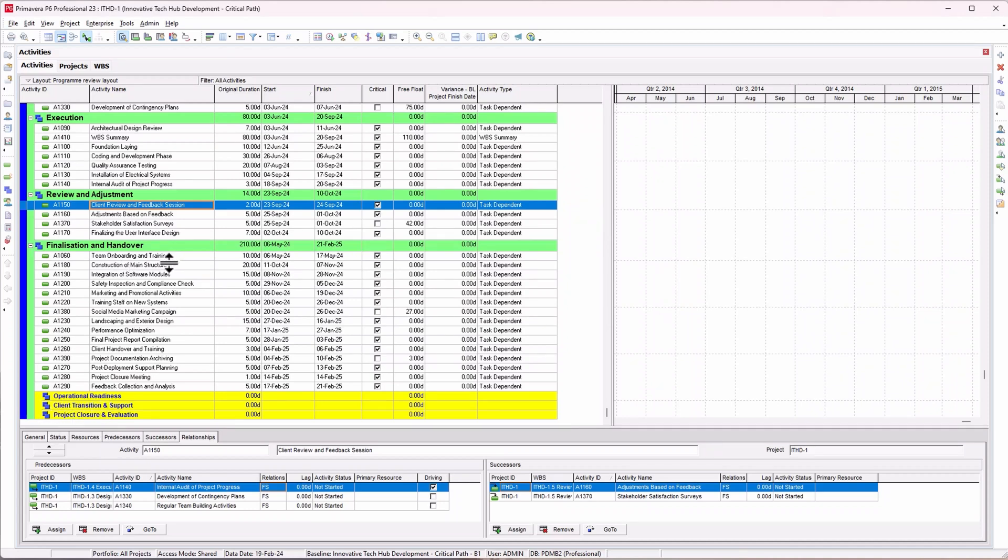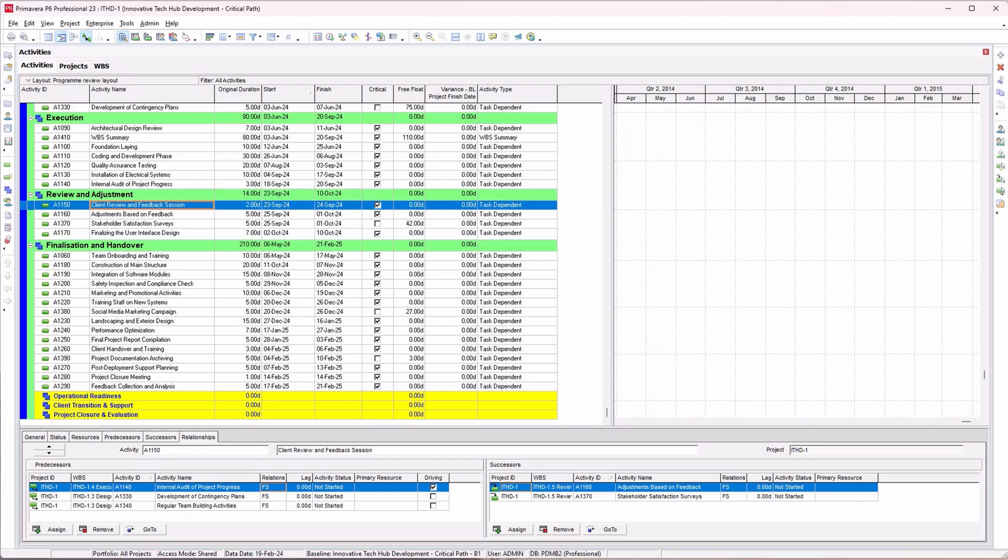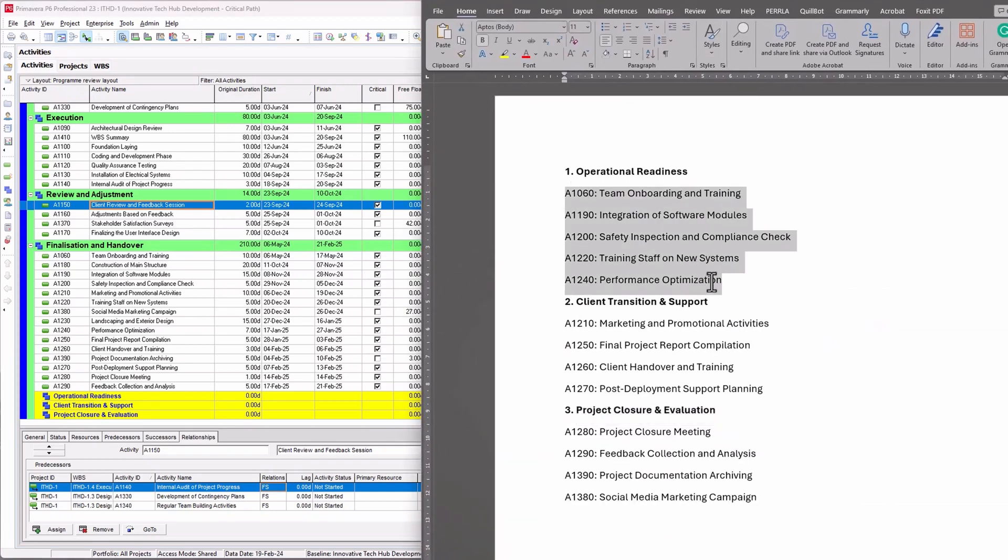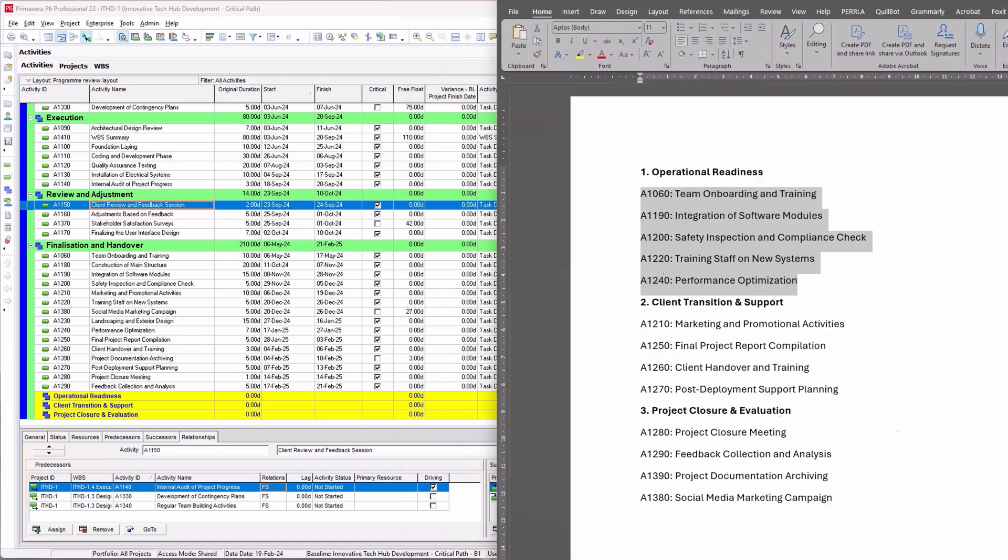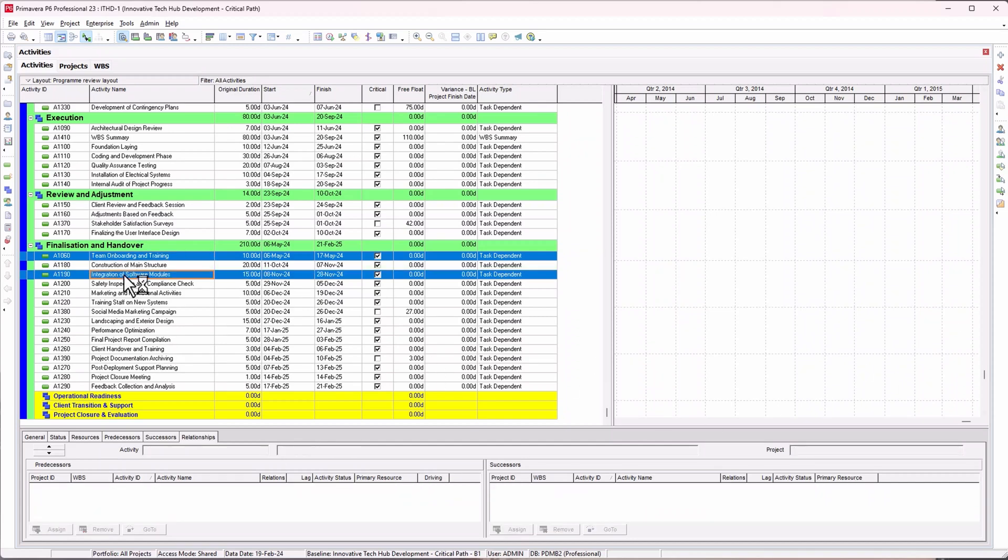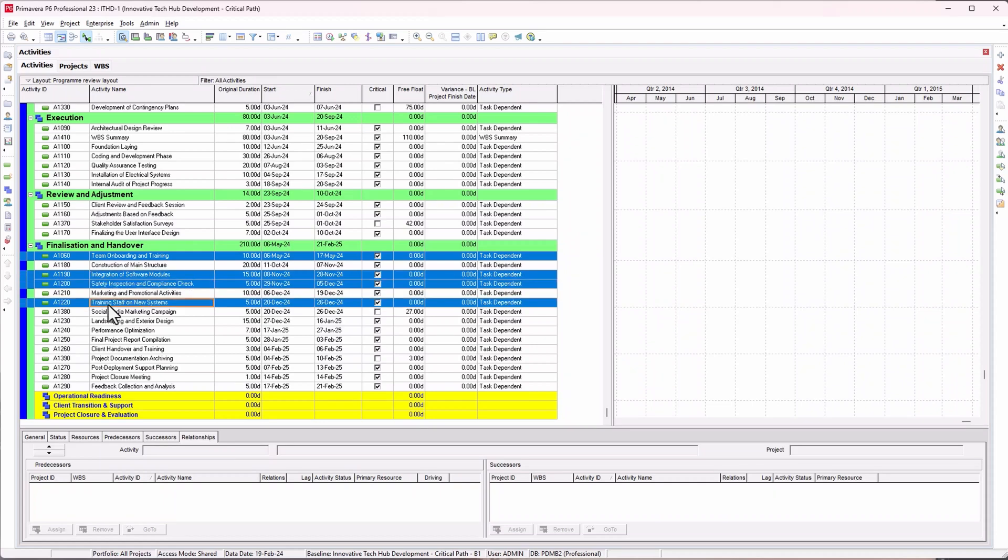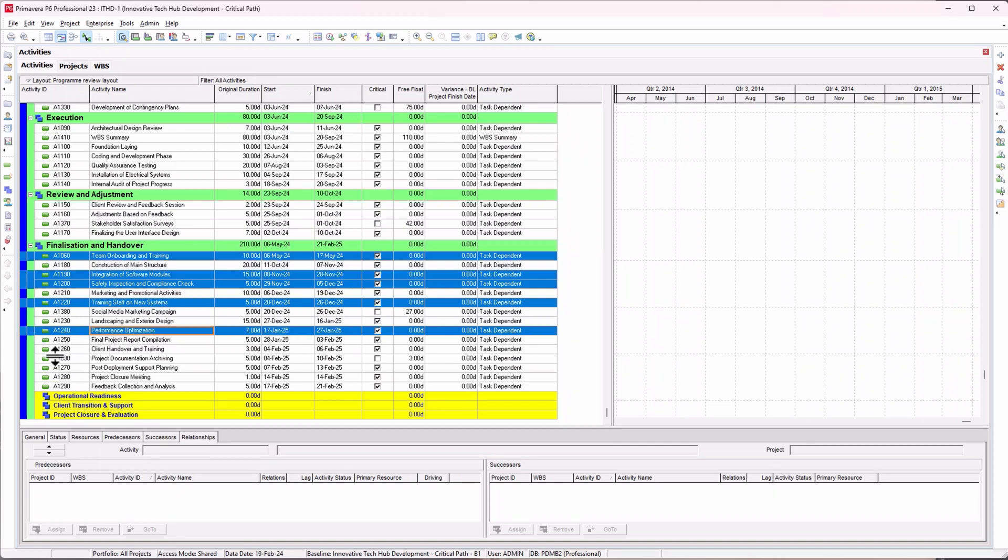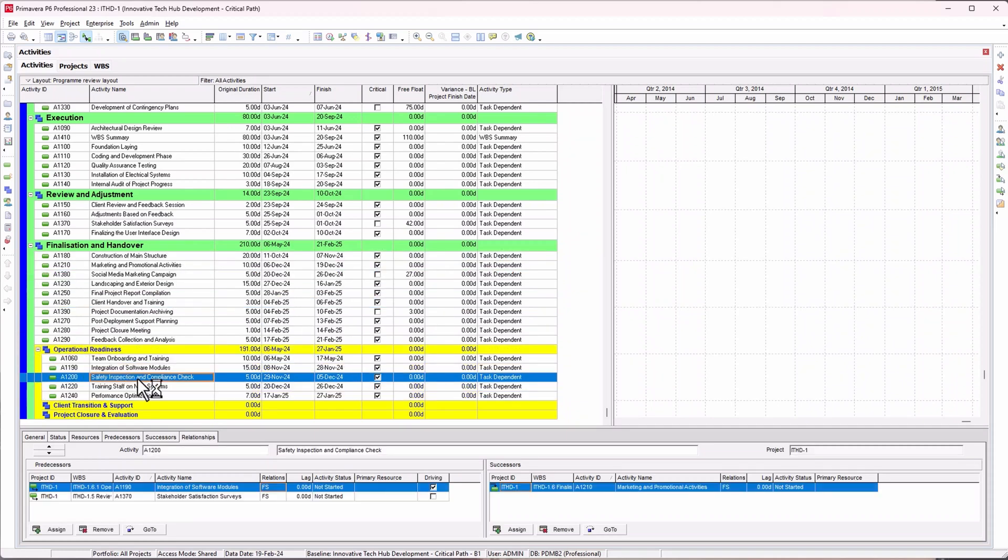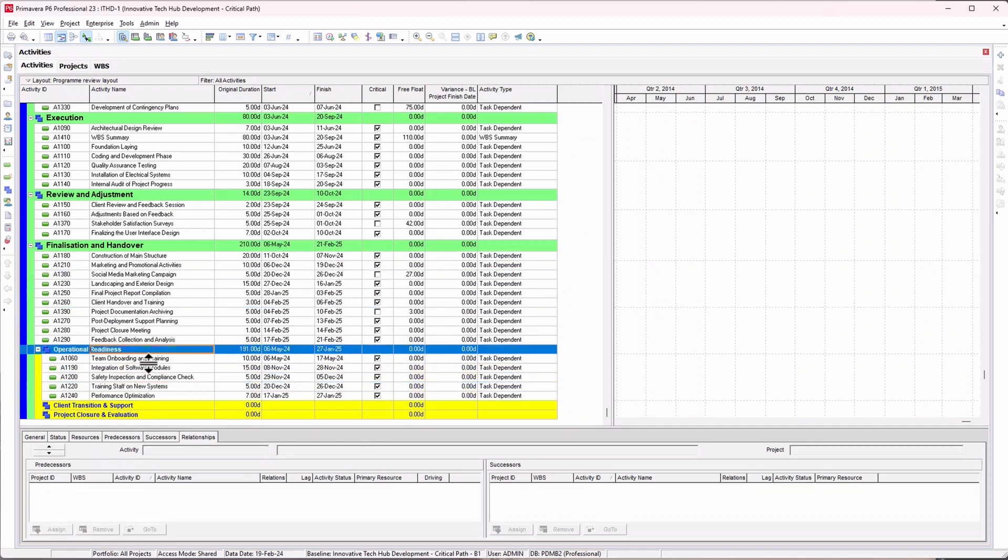All I need to do now is move the activities based on the feedback from the project manager. These activities need to be moved underneath operational readiness: team onboarding, integration, safety inspection, training of staff, and performance optimization. I'll use the first method. Click and drag everything underneath your WBS.